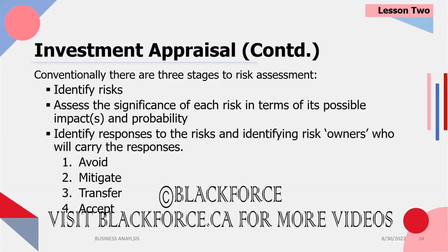Investment appraisal. Conventionally, there are three stages of risk. One is first identify the risk. Okay? One risk is that people are going to quit a lot because we're doing automation. Then you evaluate how big the risk is. Like, what are the chances the risk would happen?